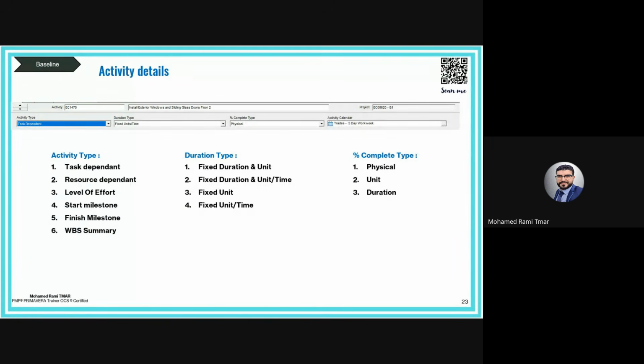is a separate table compared to the activities. We cannot link WBS. We cannot assign resources at the WBS level. Okay, this is not the case in MS Project. Even between WBS you can create a sequence, which doesn't make any sense.